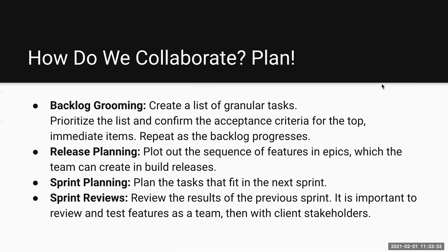Ultimately, it is the product owner who represents the interests of multiple parties, including your client and your users. And they help work with your team to identify, okay, what do we do first? I know I want to accomplish this first, but is there some step that has to happen before then? That helps you with your tasking. Writing good acceptance criteria, making sure that before things are worked on, there are good estimates, you know, groom the backlog. It takes a team, and it does take time. But the more you do it, the faster you get at it, and the more you're communicating early instead of making lots of assumptions and there being disasters towards the end.